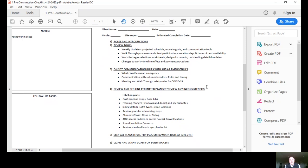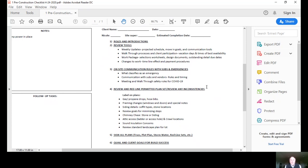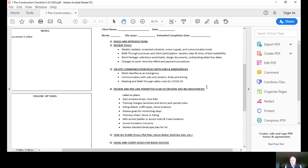The next topic, number three, on-site communication rules with subs and emergencies. We want to really define what an emergency is. That's typically it could be vandalism, maybe water, maybe a water line got broken or something like that, fire obviously. The other types of communication is more of a timing thing and that's why we like to use the weekly. We send those out on Tuesday afternoons, we try to have your feedback by Friday, and that allows us all to kind of swim together in the same pool.